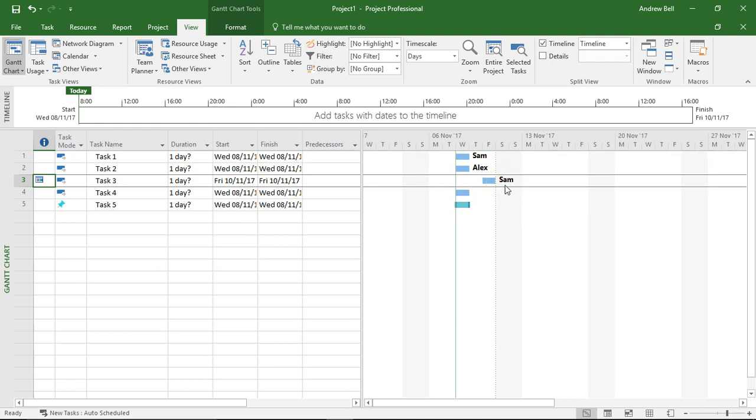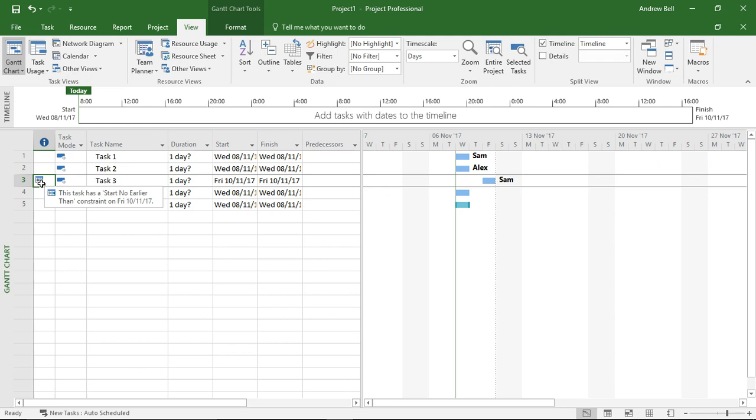But a bit of a problem from my viewpoint anyway is that task 3 has got a constraint on it, and the constraint is start no earlier than Friday. So I see this is a problem: dragging things around in the Team Planner, which is very tempting to do, actually constrains tasks to dates and it doesn't put any dependencies in. So got to be very careful when we do this.